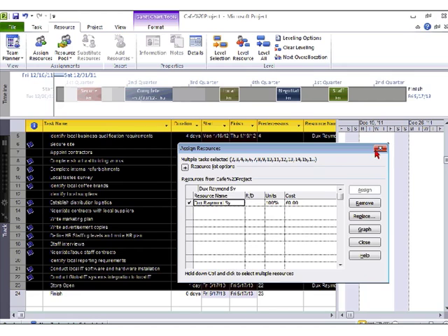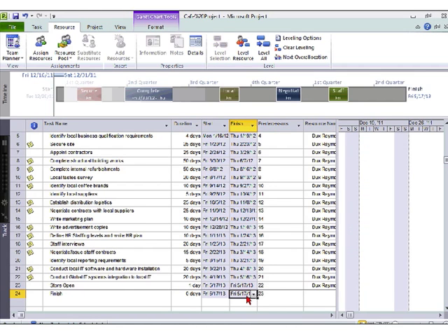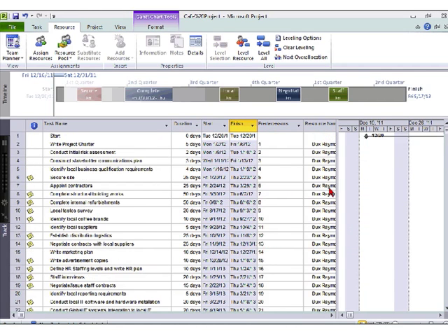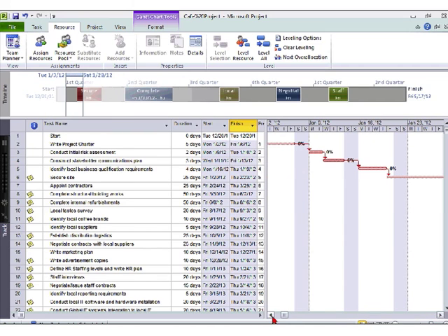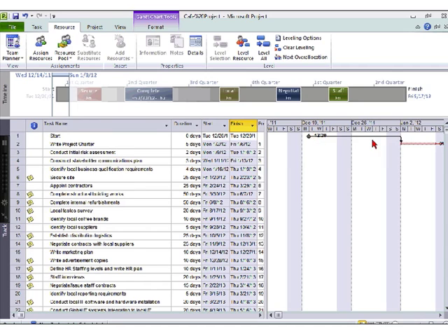Look at that. The tool, right, I've assigned Dux to do everything. Notice that for the first task, there's a long line of nothing. Well, that's because Dux is on vacation. This is a great tool that you can show to management and say, look, management, you've only given me Dux, and because of that, he's going on vacation. Now this project will take a month longer. Now, they might say, that can't be. You've got to finish it in April. Well, what is it going to be, boss? Either you give me more people to help me with this, or you tell Dux not to go on vacation.